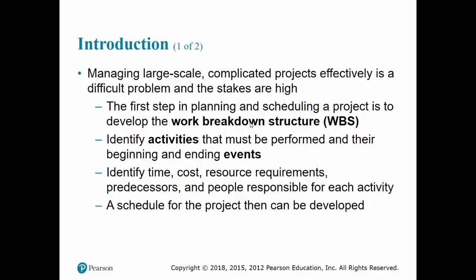And then for each activity we have to identify how long it will take, the duration for the activity, and how much it will cost. And there is more about cost that we have to talk about. Like for instance, I mentioned that there is a possibility that if you spend more money, you may be able to complete the activity in a shorter duration of time. So that's called project crashing. So we'll talk more about that a little later.